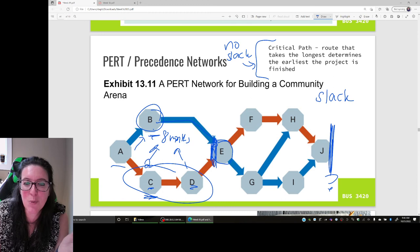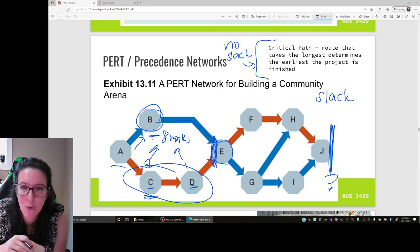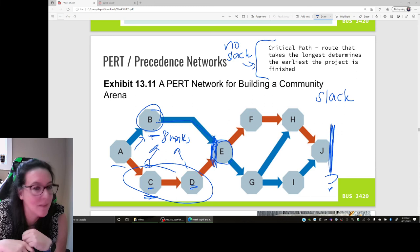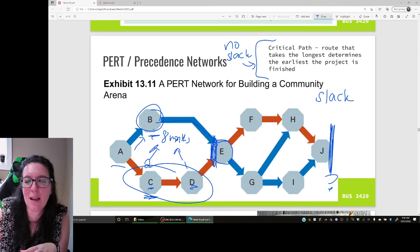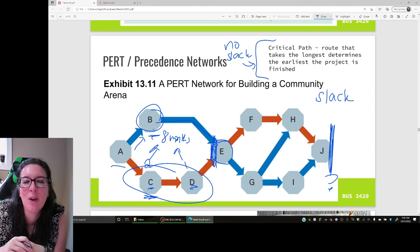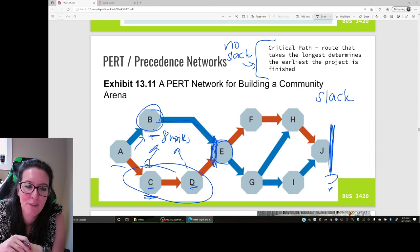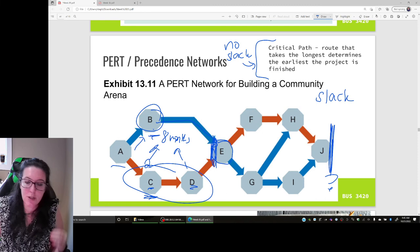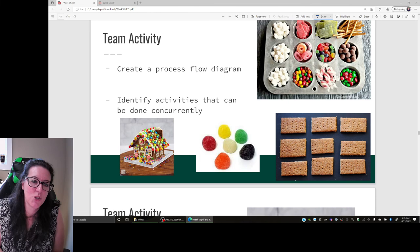What you need to know in intro management: as we plan how to do something, we have a precedence network or PERT chart showing the dependency of activities — E can't happen until B, C, and D happen; C depends on A but not on B. We also need to know the idea of a critical path. Activities on the critical path have no slack and determine the final project completion date. Activities not on the critical path have slack and offer flexibility in when we start and finish them. We're separating out planning from doing with the Gantt chart, the process flow diagram, and our PERT charts or precedence networks.